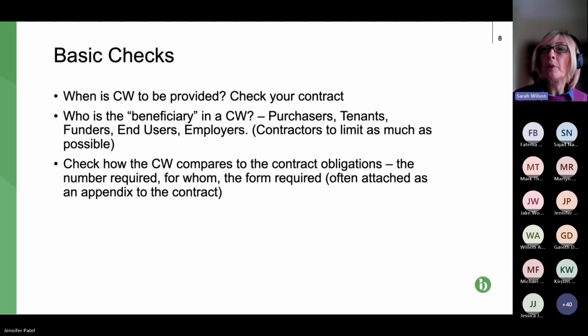But of course, if you are to provide a subcontractor warranty within 28 days from request, that is when you need to incorporate the relevant provisions into your subcontracts. So you can then say to your subcontractor, "I've been asked to get a collateral warranty from you, so can you please provide it?" And they've got no reason not to. Whereas if there's no requirement in their contract to provide the warranty, the contractor's in difficulty because they have to provide it, but they've got no lever in their contract with the subcontractor to get it.